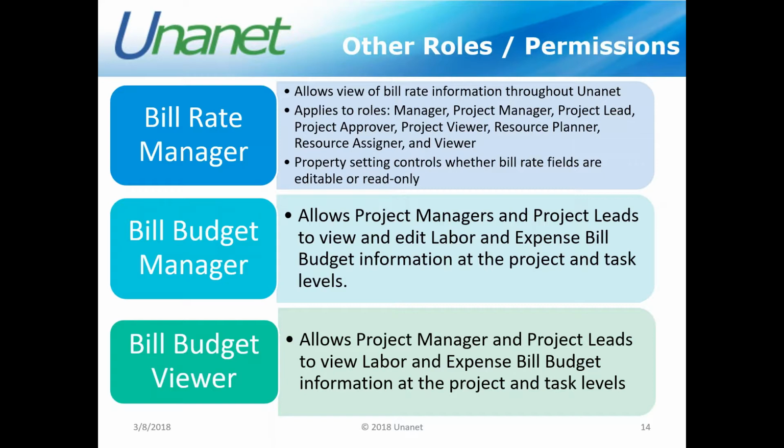You're not able to see bill rates when you are in the project. You're not able to run reports to get access to bill rates. If you were running a report on projects, you would just see number of hours. You would not see anything that had to do with the bill rates.